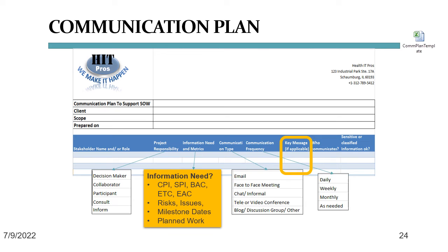For example, I was once running a project that changed the ways in which 4,000 employees ordered their company cell phones. We were transitioning from a decentralized approach in which everybody would just send the department secretary an email to a centralized ordering portal with management approval flows, billing reviews, and so on. As you can imagine, that is a big change, especially since employees would not be able to order the newest iPhone anymore, but one from a number of phones that had been pre-selected for their career level. And their management would have insight into their phone bills.